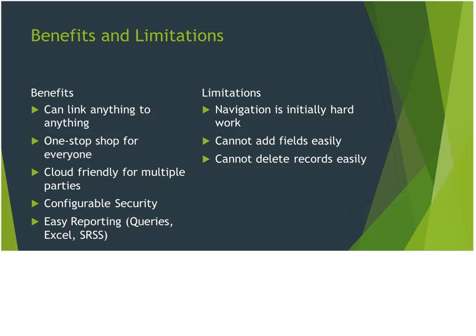So in our case, we have those business requirements. We needed to get 1,000+ business requirements into TFS. How we did that was using the Excel reporting. We ran a report on the essentially blank system, saying show me all business requirements in the system. We exported that to Excel. We then pasted in from our spreadsheet the 1,000+ business requirements, and we literally just pressed the publish button, and they're in TFS, and it is that simple. We've got a similar process in CRM with the export and then re-import through the import wizard, but this is literally a one-button click. It auto-assigns the IDs, and it works really nicely.